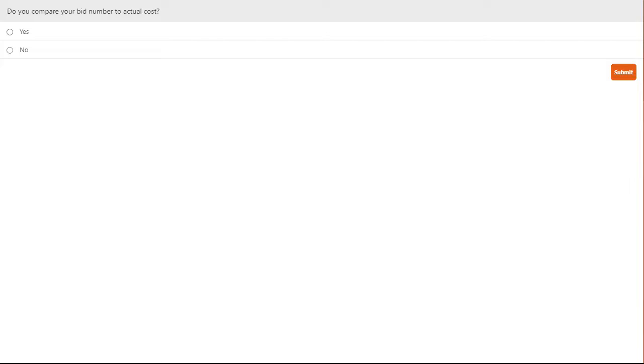And we're going to challenge that a little bit, because you've really got to know what the execution is out in the field. If you want your historic tables, your historic charts, all the data that you have when you're building these estimates, if you want it to be accurate, it's got to be updated. It can't be from 5 years ago, 10 years ago. I would say now with the COVID filter, it can't even be from last year. The work that companies are bidding right now, you got to put the COVID factor on it. Let's be honest. And I'm not sure what that factor is. Each company's got to determine that for themselves.